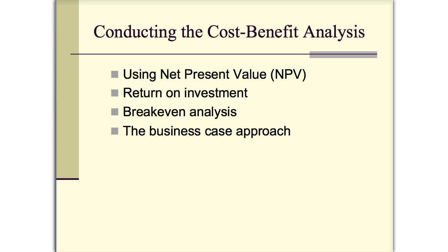Your break-even analysis, you're looking at how long it is going to take you to make back the initial investment in the system. And then the business case approach is where you are looking at specific scenarios that this particular system can improve or make better.